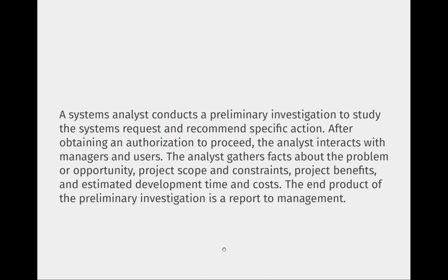Once you approve this as a project, then you can interact with the people. So you can collect information on the problem, the opportunities, the project scope, constraints, project benefits, and estimated development time and cost. So the end product is simply a report to the management.